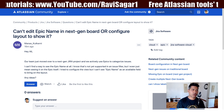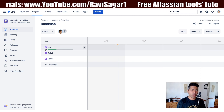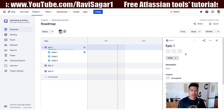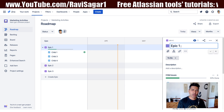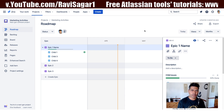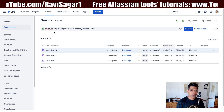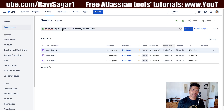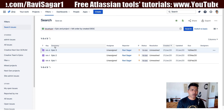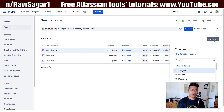I was not really sure about this question because when you are looking at your roadmap in your next-gen project, you can take a look at your epics of course. When you click on the epic, on the right-hand side you have this view where you can change the name here, so changing the name is definitely possible. You can also take a look at the issue navigator where you can apply a filter based on issue type equal to epic and project equal to your next-gen project, and then look at your summary and different columns.